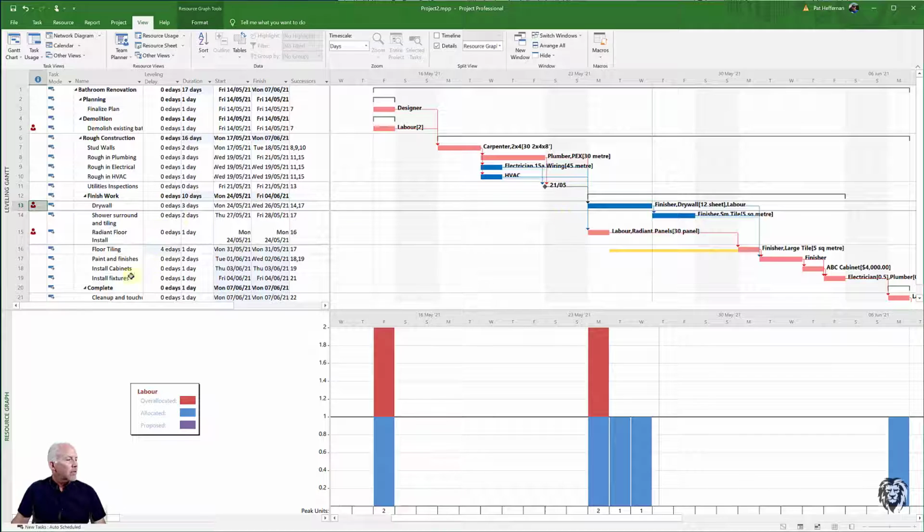So all of this is labor. So I've completely fixed or accommodated the over allocation of finishers, but I've still got a labor over allocation, and I've actually introduced an extra labor over allocation because of assigning my laborer to the drywall, and that really does demonstrate some of the interdependencies of the various resources. Leveling one resource may actually cause you issues in another resource, and so we're going to have to go through some iterations to try to find the best path.